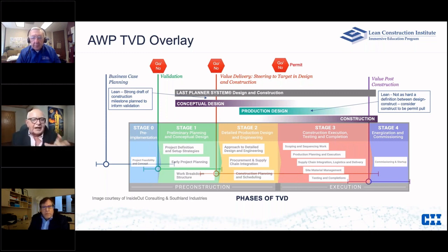And we're starting out with the blocking and stacking and all that sort of thing, based on the vision, based on the user's case, and the stakeholders' needs. And very early project planning in terms of, are we going to be doing prefabrication and pre-assembly? And let's design for those kinds of things. How are we going to be mobilizing to site, and what are the site constraints? So very early site investigation is involved at this point, and analysis of documents, and analyzing where the dragons are in this. Where are the difficulties?